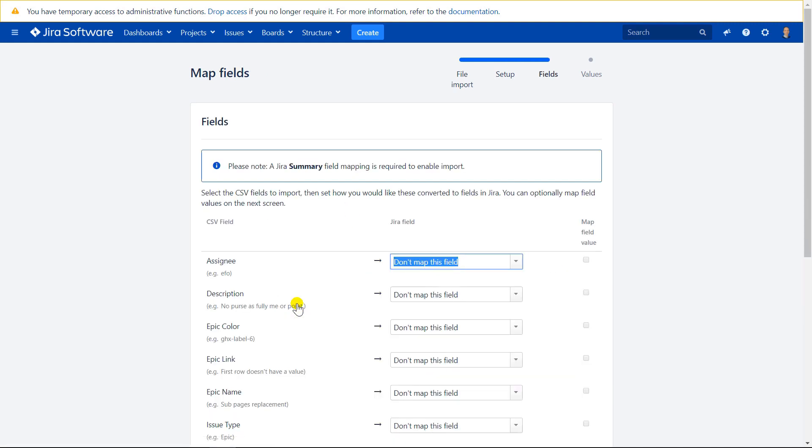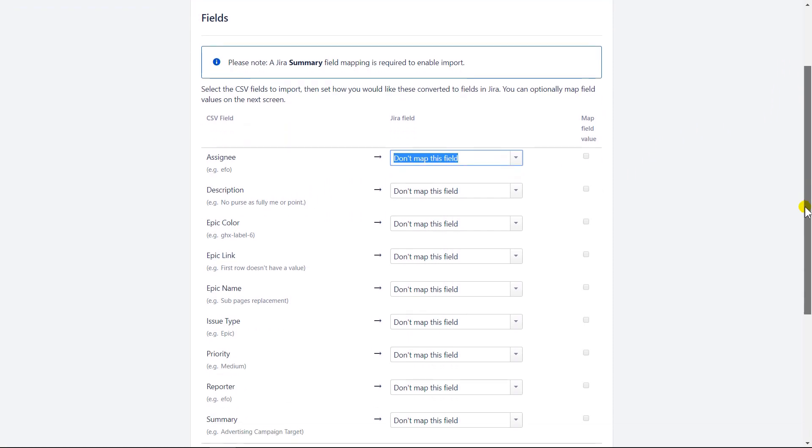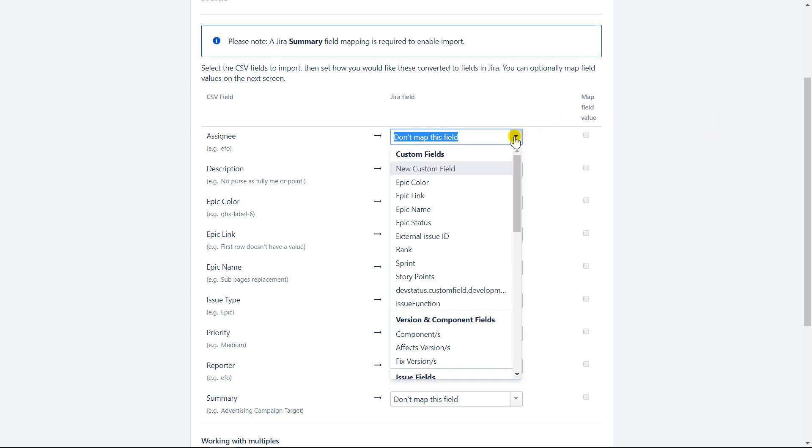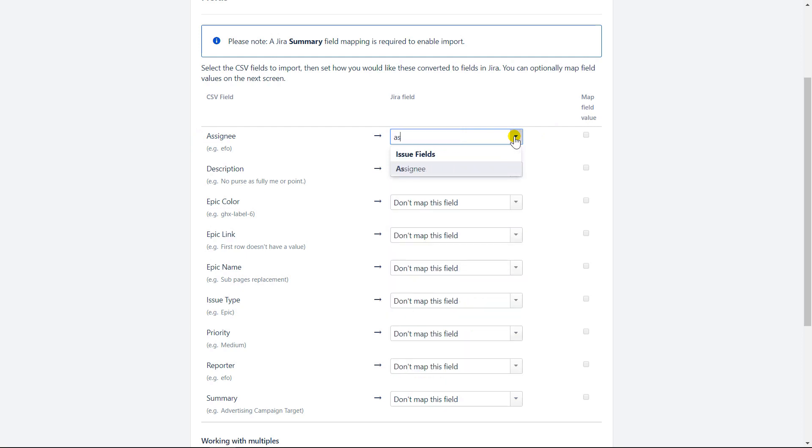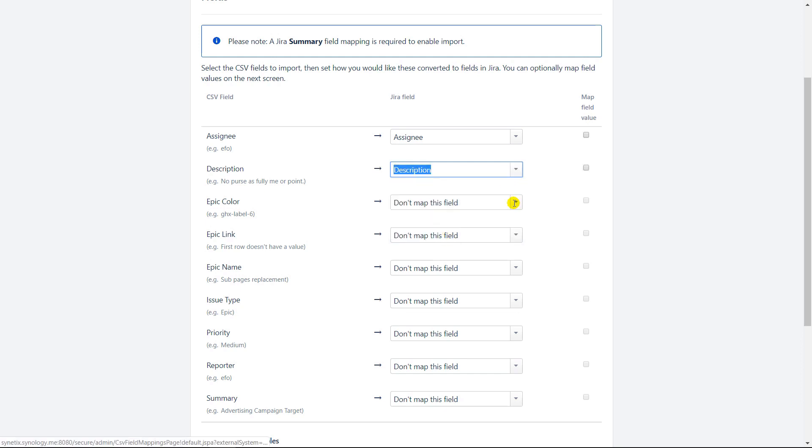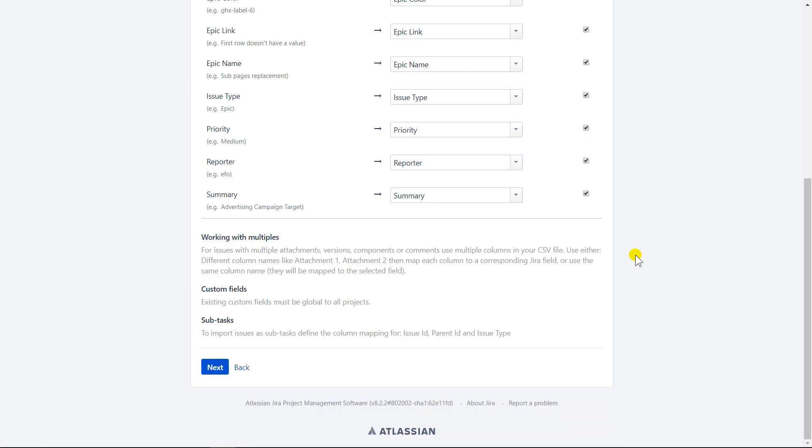On this screen, you need to perform the field mapping. Sometimes there are errors in the CSV file and you can easily spot them when you press the map field value checkbox. I always use that option in my data migration to Jira. This is how it works. So Assignee, looking for Assignee. Description. Description. Now, when you are ready with the mapping, press the button next.